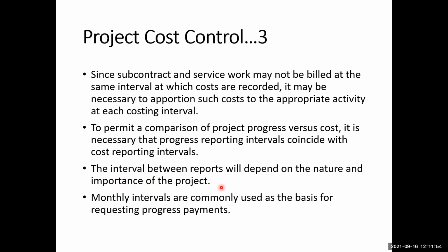The interval between the reports will depend on the nature and importance of the work. For smaller projects, the interval will usually be smaller. For larger scale projects, the interval may be set at a longer period, such as on a monthly basis. But of course, if some milestone is approaching and that milestone in the project has to be achieved on time, then that progress reporting period may be lowered as well, maybe to a weekly basis or less than weekly.